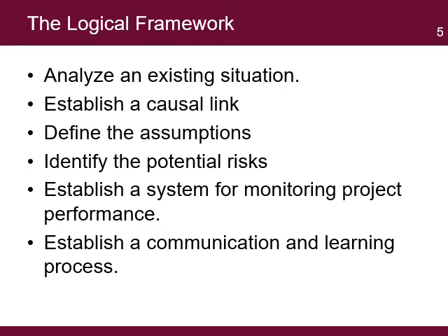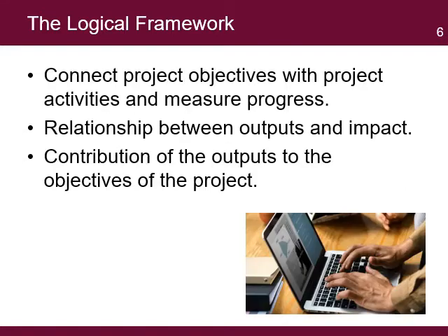The log frame helps the project to analyze an existing situation, including the identification of stakeholder needs and the definition of related objectives. It establishes a causal link between inputs, activities, outputs, outcomes, and objectives. It defines the assumptions on which the project logic builds, identifies the potential risk for achieving the objectives and outcomes, establishes a system for monitoring and evaluating project performance, and establishes a communication and learning process among key stakeholders.